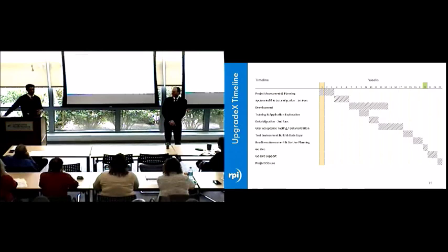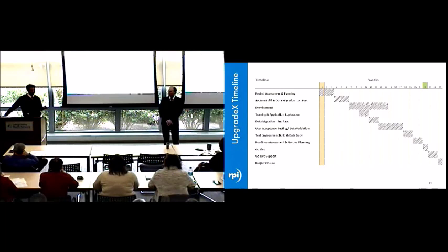And at the conclusion of the first pass, we'll turn the system over to the users for the first pass of testing, which might be qualitative in nature, users logging in, doing some application exploration, exploring the new version 10 functionality, getting familiar with the system for the first time. The second pass is more refined. At that point, we're making very specific additions or subtractions to what will become your go-live cutover punch list or checklist. Again, we're running the timing to make sure that it's adequate.